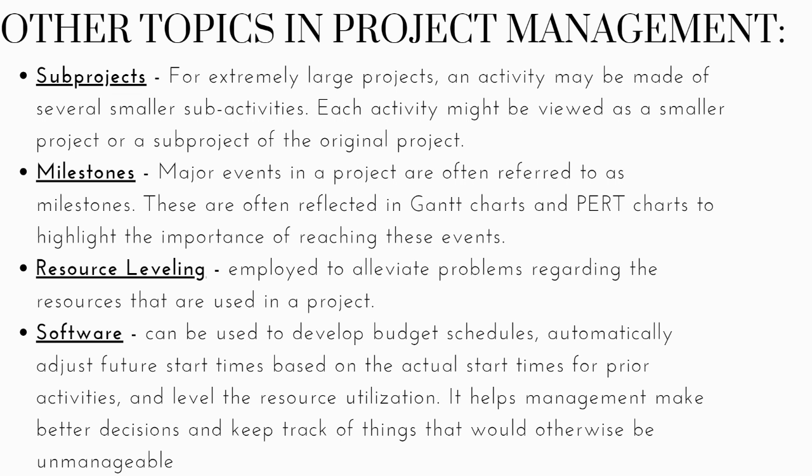To alleviate problems such as this, resource leveling is employed. This means that one or more activities are moved from the earliest start time to another time, no later than the latest start time, so that the resource utilization is more evenly distributed over time. If the resources are construction crews, this is very beneficial in that the crews are kept busy and overtime is minimized.